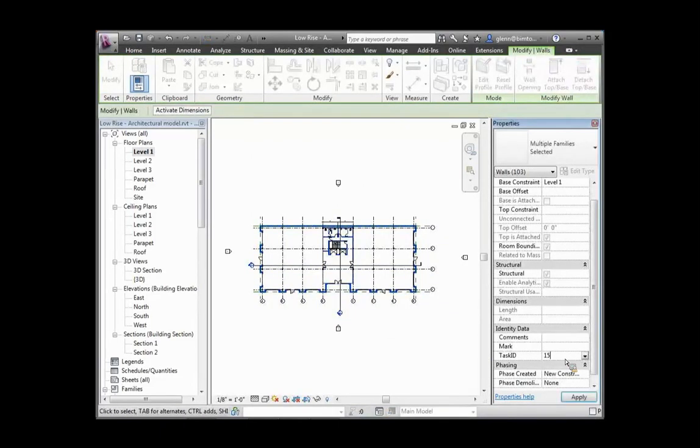Your goal is to go through your model, find the elements that you think of as construction items, and associate task IDs with all those different items. The reason why I'm doing it this way is I have a lot easier time selecting, controlling and assigning things in Revit, because that's a familiar file format for me. I understand it there, more than I do over in Navisworks. Let's stop with this item.